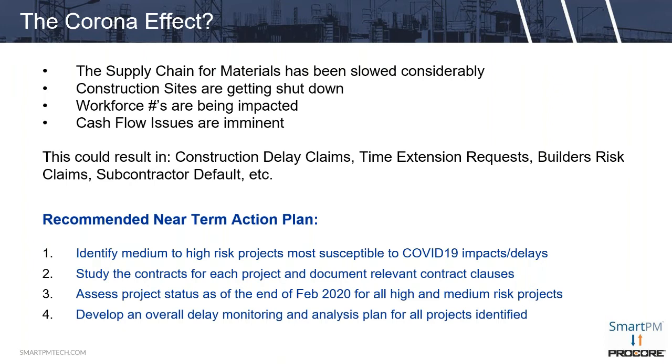But really understanding what that means to your various jobs, it could be different on certain jobs. Looking at force majeure clauses, looking at time extension requirements, always making sure that you have a process for actually analyzing it and understanding it. And if it's not cut and dry in the contract, we then have to start thinking about insurance and how to manage that.